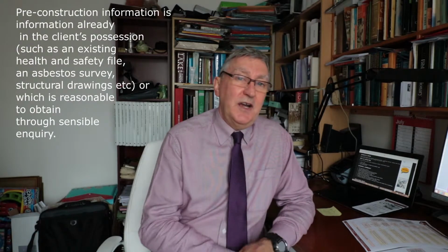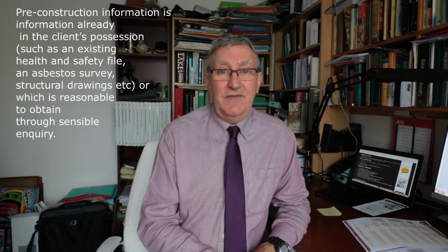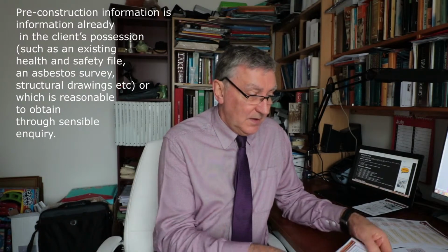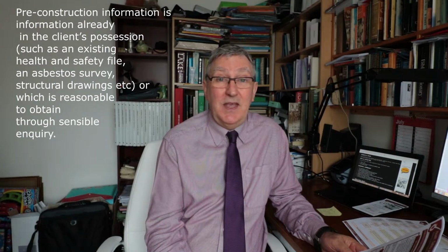The client must provide what's called pre-construction information to that contractor. Pre-construction information is just basic information about that project, however quick and brief it might be, and about that specific site. Things like what's expected, what does the client actually want, what the client believes is going to happen, key dates. The contractor might be there for weeks, might be there just for a few hours. The resources and time and allocated arrangements between any other duty holders, if that applies.